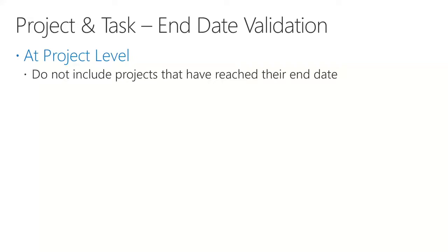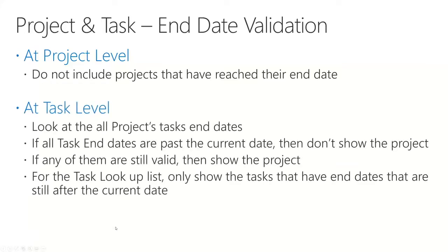So let's say I set up a project and task for June, or a project for a specific time frame. I can actually have it automatically turn off after a certain date, and I don't need to remember to jump into SL and make any changes. It just means it will no longer show up. So I can no longer put time against that project, or I can do it at a task level. So I could say there's a June task for this project, there's a July task, there's an August task, and I can literally have it shut off at the end of each month. So when we're doing time, we're only capturing things against that specific task. So it really enables it.